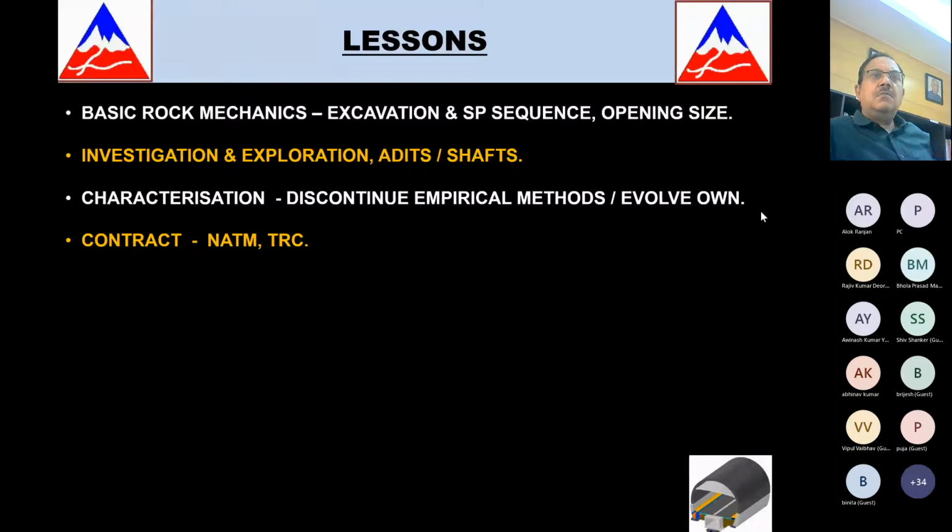Very important. We must understand that for all tunneling firms, there is a very huge overhead. So if they are not getting progress because the ground is weak, then most of the time is lost. So it's important for us to understand that there is an overhead cost per day being borne by the contractor if he stays on site, and if geology is not helping, having to bear the overhead cost, there should be a way in contracts to compensate that overhead cost.